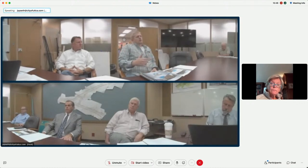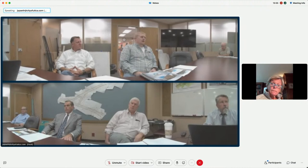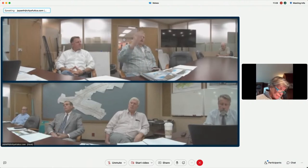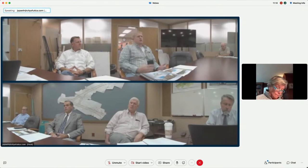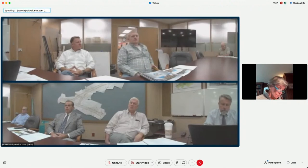To answer your question, John, the New Century project isn't experiencing as much escalation as 1900 Bleecker. Lumber prices recently dipped to a 30-year low. That building, if you go on the inside, is all wood. So our budget for lumber is actually coming in less, which is offsetting some of the other costs. And we don't have as much equipment in that building as well. So budget-wise, we're pretty much on par.